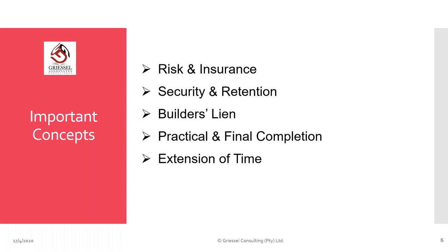Obviously, the contract provides for extension of time, but the extension of time provisions are not as formal and as specific as those that you would, for instance, find in bigger contracts, such as the JBCC contract. We've tried to write it in a manner that it's as wide as possible to allow you to claim for extension of time under most circumstances. And the principle we're talking about here, that you are entitled to fair and reasonable extension of time where there's any unforeseen delays.